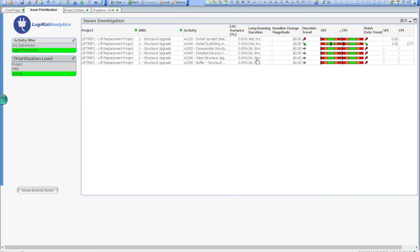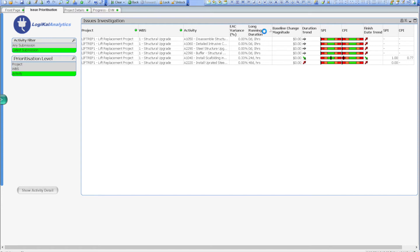For example, this level is perfect for running schedule quality checks, such as identifying all the activities across my programs that have durations greater than 20 days, which I feel will lower the quality of my programs. But back to our schedule analysis.